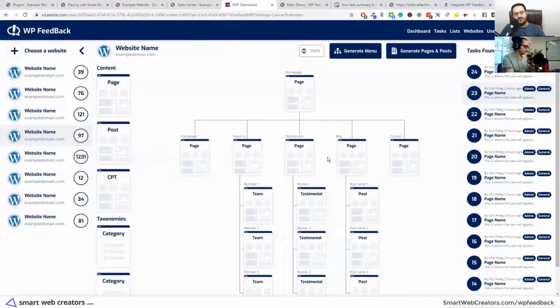This will give clarity also. When you start a project, the client would say, oh, I just need a 10-page website. But in the process of doing the website, they say, hey, I forgot 5 more pages, and you're stuck with that estimate, looking left and right. What should I do? Revise the estimate, or how do I adjust? But if you already decide on the sitemap, or the basic structure of the site, then both the client and you are already on clear terms about what we are dealing with here. That's why we added this step, because this basically cancels out scope creep.